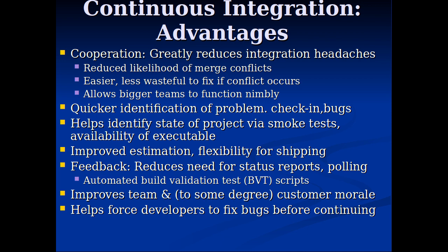And you're checking things in along the way, so you don't get this giant collision with a whole swath of changes checked in by someone else. Instead, you're doing it a little bit at a time. So if there are errors and incompatibilities, they'll be at a smaller scale, rather than thousands of lines of code from each of you not playing together nicely. So incremental development helps with quicker identification of problems and greatly reduces integration headaches, my code colliding with yours in a horrible way that leads to hundreds of error messages. And you can actually build it and get out a working system.